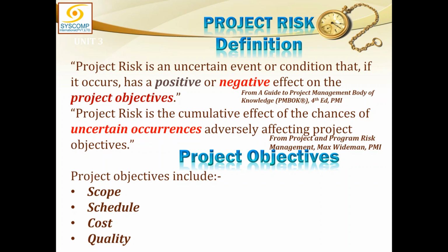Then I have already talked about the project objectives. Basically, we have scope, time, and cost, and in addition, we can sometimes entertain quality as an objective, but not from the measurement point of view, because baselines can only exist for scope, time, and cost. Therefore, for those purposes, project objectives are considered to be scope, time, and cost.